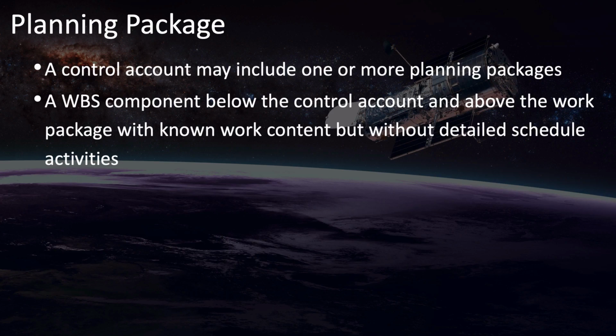The difference here with the planning package is that it doesn't include detailed schedule activities. Without the schedule information, it doesn't really qualify as a control account because a control account is used to measure performance on cost and schedule. But it may still be useful for planning.